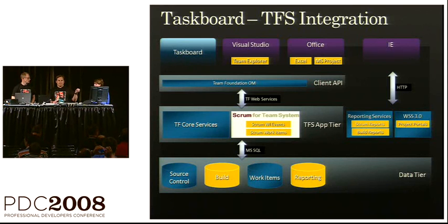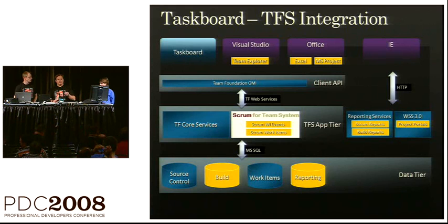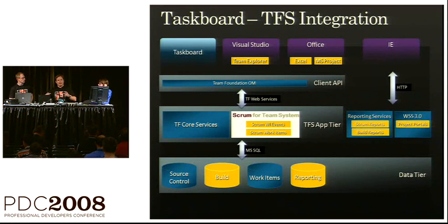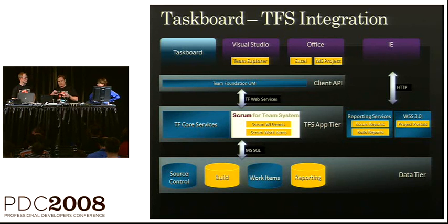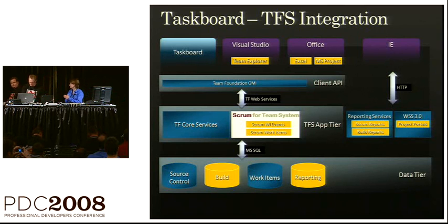So again, if you move a product backlog item from one sprint to another sprint, it'll actually go and find all of the associated tasks and move the iteration path for those things. So you can do those macro level things that you built into 2010. You can do them today using the task board. Great. So. Thank you so much. That task board UI is pretty great.